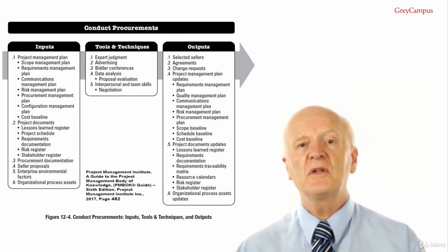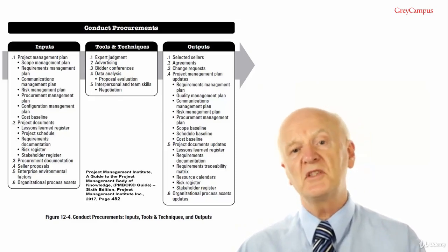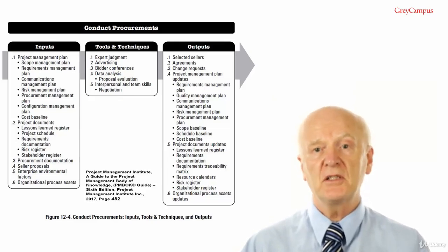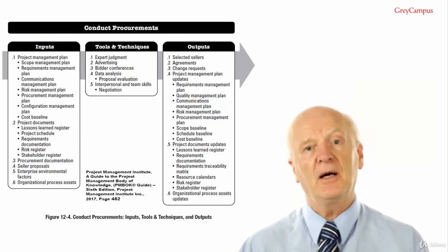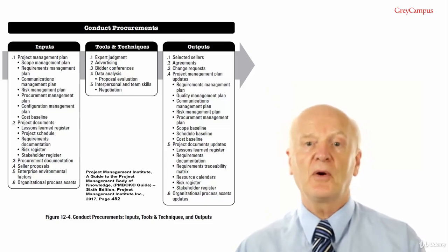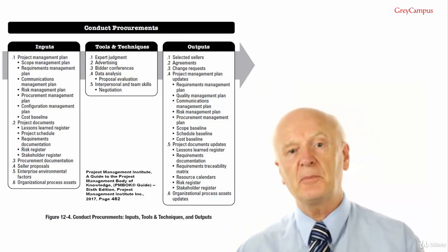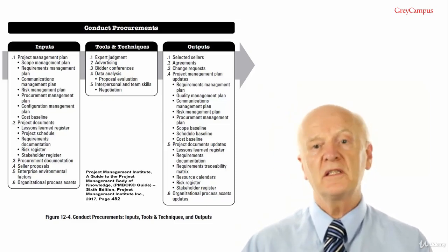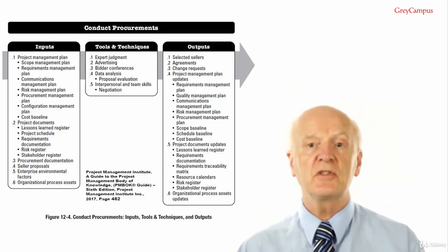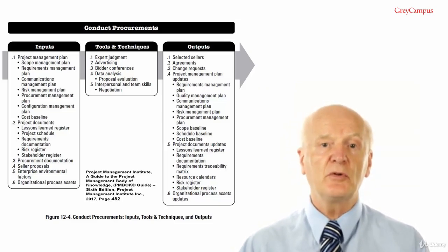The major components in an agreement documentation will vary, but they may include procurement statement of work or major deliverables, schedule, milestones or date by which a schedule is required, performance reporting, pricing and payment terms, inspection, quality and acceptance criteria, warranty and future product support, incentives and penalties, insurance and performance bonds, subordinate subcontractor approvals.